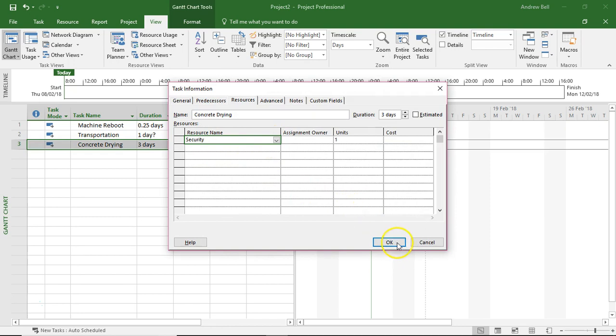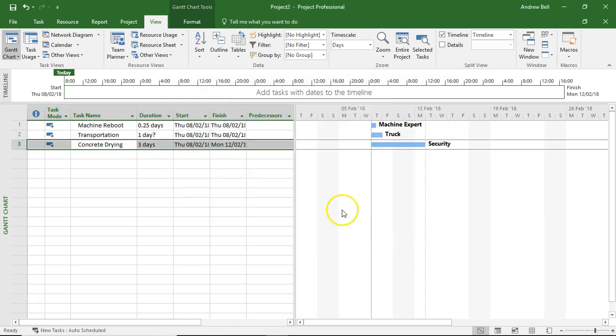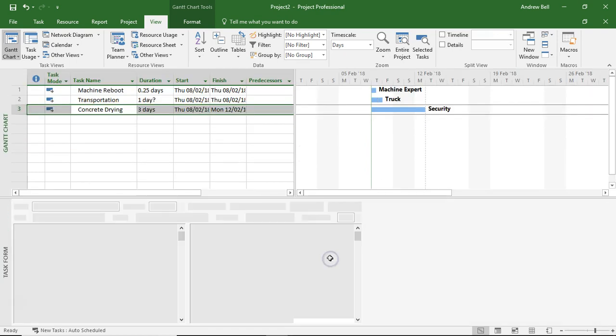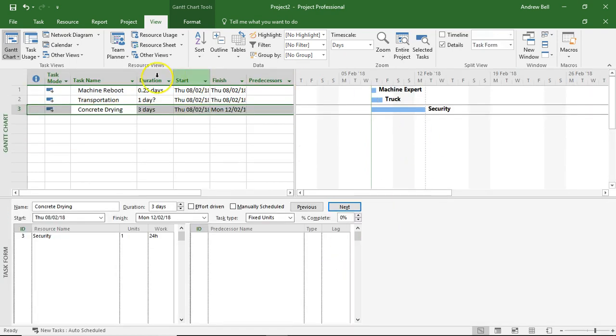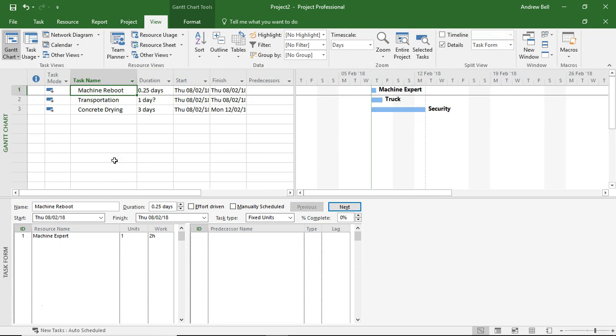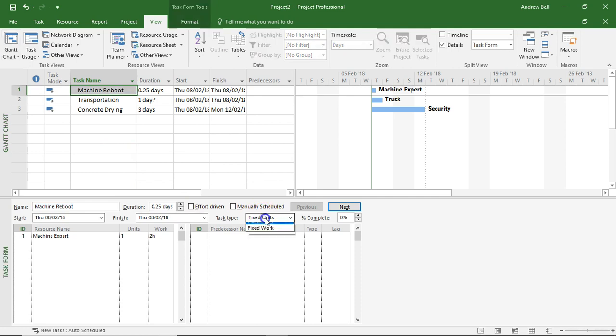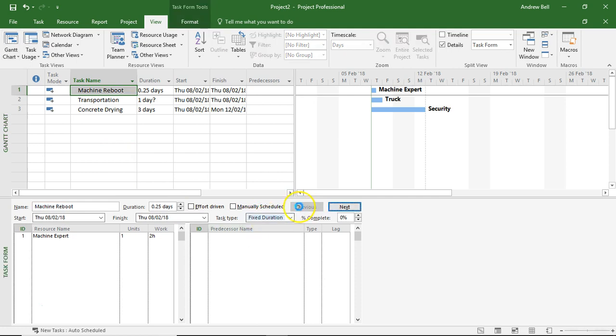Let's have a look at what's happening here. I'm right-clicking on the Gantt chart so I can see the split. I'm going to start with the machine reboot task. The machine reboot is going to take two hours or a quarter of a day, and it doesn't matter how many resources I put on it, that's how long it takes for the machine to reset and recheck itself. So this task is going to be a fixed duration task. I've changed it to fixed duration, clicked OK.